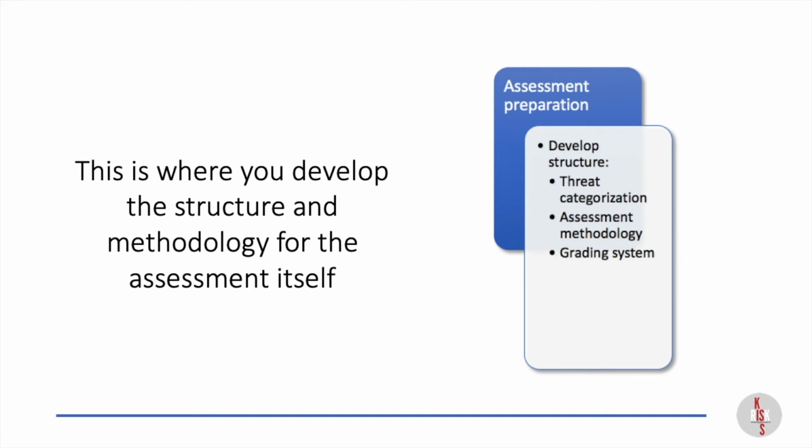But the important thing is before you start doing any of the assessment, understand the structure, understand how you're going to categorize your threats, because that will drive a lot of the structure of the final report. Understand the methodology you're going to use for the assessment, and understand the grading system. And the key thing is to make sure that everyone on the team is using the same structure, using the same system. Because obviously there'll be huge problems if you get into the actual assessment and then discover that somebody has been doing their own thing.